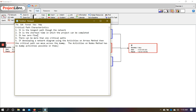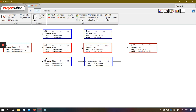The third characteristic of the critical path is that it has zero float. If we take the top path A, B, E, H, which is 22 days in length, then 24 minus 22 implies that there is a two-day float period available on the top path A, B, E, H. So we have two days of float available. It is up to us whether we consume the two additional days on activity B or on activity E, or delay B by one day and take one extra on E. So it's up to us how we spread those two days across B and E. The essence is that B and E both have two days of float time available.